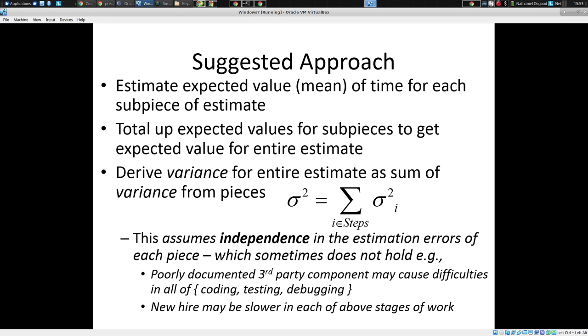And these techniques provide a principled way of doing that and provide a principled way of going from range estimates from small pieces up to range estimates for the whole that are realistic and that take into account our over-optimism in estimates. At the same time, they're not absurdly wide in terms of, you know, assuming every single thing goes bad or every single thing goes as good as possible.